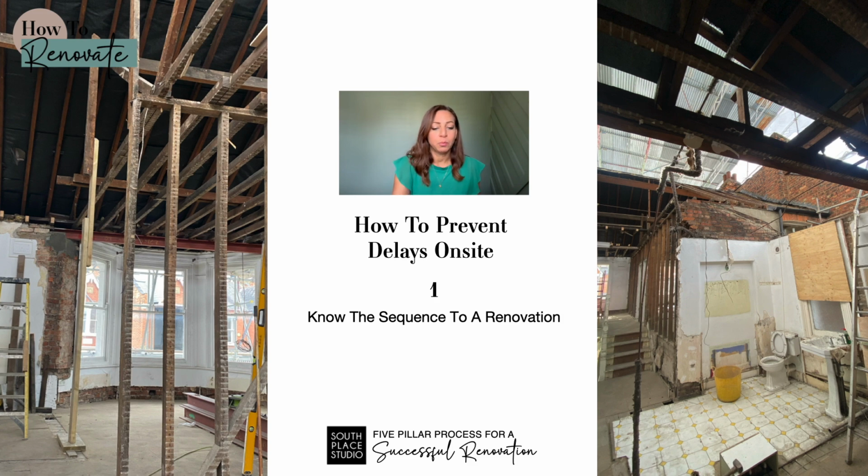But let's get into this point. So if you know the sequence of a renovation, you are already ahead. You can then help prevent delays because you will know when you might have long lead times for certain items. You will know when the builder's doing something that might take a little while or take a little extra time, and you also know the sequence or the times which the builder might need certain materials.